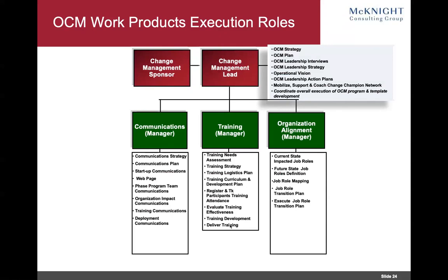There are different ways you can get that 10%. You can say when you go to the budget committee, 'I need 10% for OCM' — that's the upfront, assertive way to do it. Another way is to bake it into the project as project tasks that need to be done. I find my clients are much appreciative of the fact that I'm acknowledging this stuff, because these things go straight to the bottom line, straight to acceptance. What are my sponsors most concerned about? They're most concerned about acceptance of the project by the powers that be within the organization.